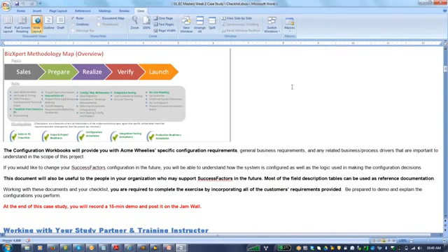Then kickoff is done, and then you do the project orientation or the discovery workshop, wherein you give a quick demo on SuccessFactors functionalities, navigation, and the different things which can be done through SuccessFactors, and prepare them on how it works. After that you do the project team orientation and give them the handbook.